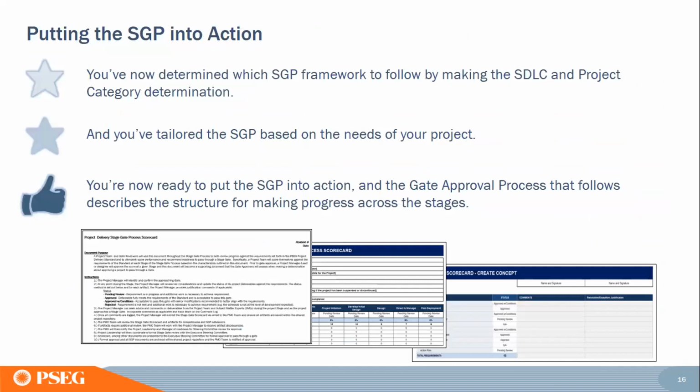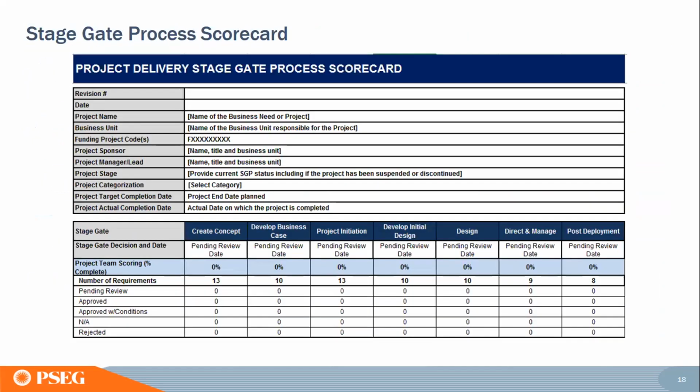Then, as I said, at every gate, you have to present the EPMO team with a core scorecard. The scorecard is nothing but capturing the information about your deliverables, right? So it has the deliverables like this. You can see by stage, you are expected to do certain things. And if you say yes, yes, yes, the score automatically becomes higher and higher. We expect this percentage to be 100% for every stage.